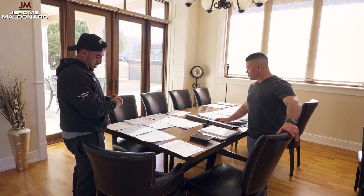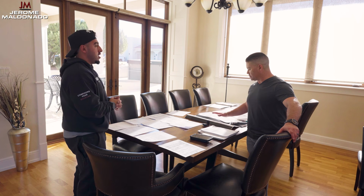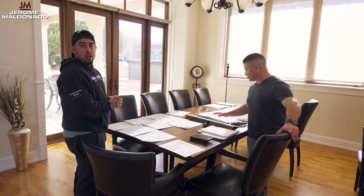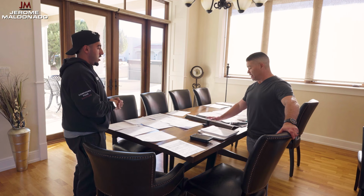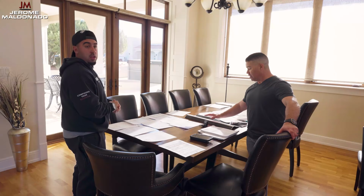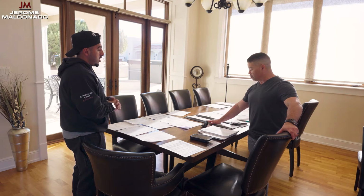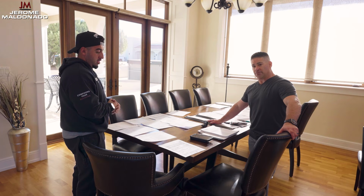But if you're doing them old school style and you're doing them on paper, you do have to submit 2 sets, because what happens is they're going to plan review and stamp 2 different sets of drawings. They're going to stamp one that they keep in their office. These get recorded whichever municipality you're with: the state engineer's office, state construction industries, the municipality, the county, the city, whoever you're getting your permits through. This one set will stay in there, stamped and certified.